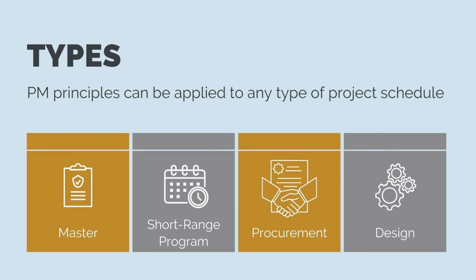what are all the tasks, what order they need to be completed in, how long are they going to take, and then we need to be showing this 3-week look ahead to our other supervisors and foremen, making sure they agree with it, making sure we haven't missed tasks. If we're managing procurement, we'll need to use these same principles. So when we're doing procurement, what are all the packages we need to prepare? What are the steps in producing the package?